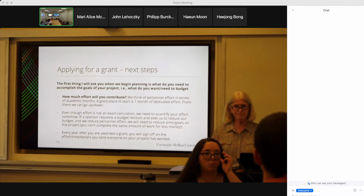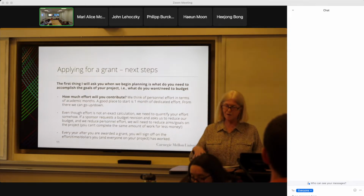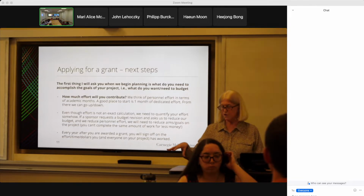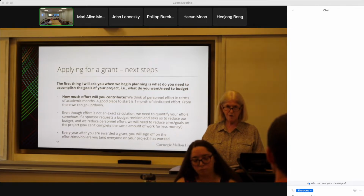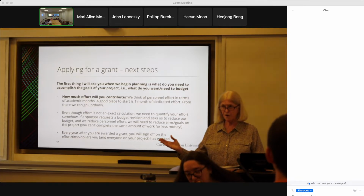I'm sorry, what is cost sharing? Cost sharing is when you say that you're going to donate 10% of your time, for instance, to a grant, but you're only going to charge the sponsor, NIH or NSF, 5% of that. That other 5% has to be formalized somewhere as to where it's getting paid from, whether it's a department or your discretionary funds, because basically you're giving a sponsor an extra 5% of your time but not charging them for it.